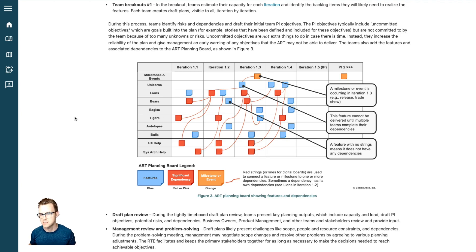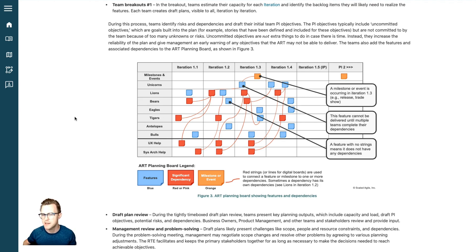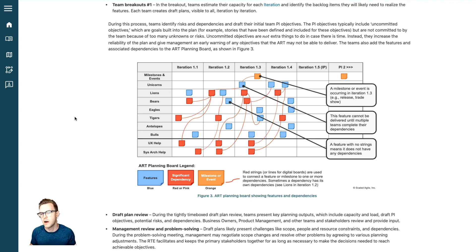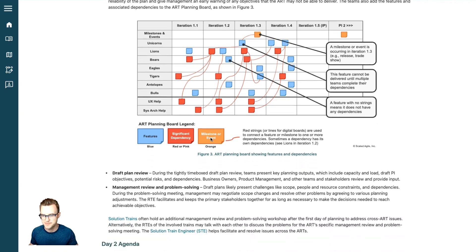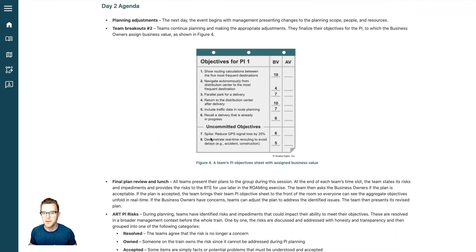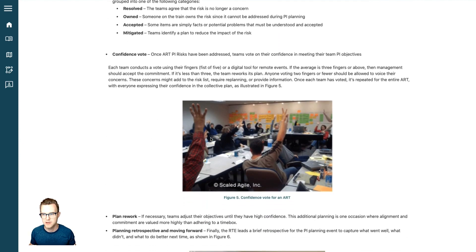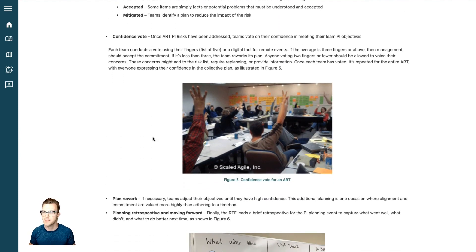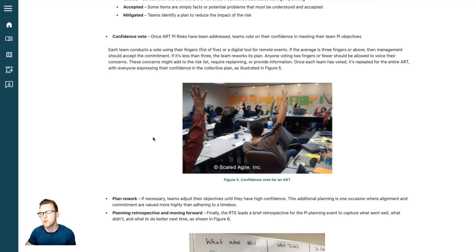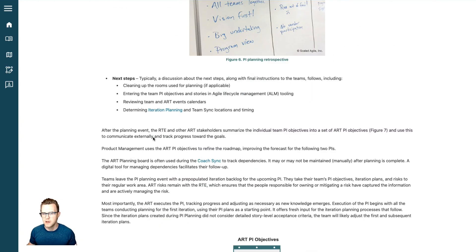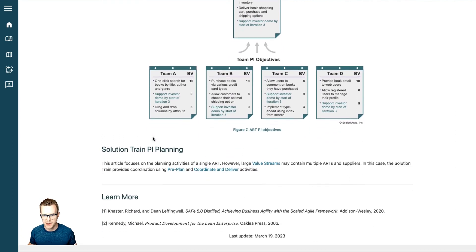What's the thing you can see really quickly here? It's those red dependencies. And so that's what helps leaders say, what things can we do to move the teams around, shift the teams up a little bit? What can we do now to prevent these red dependencies from actually causing issues on the roadmap? You can talk about that now versus when it's already too late and it's already occurring. Maybe in iteration 1.2, you're already here, might be already too late. The idea is you're bringing up, aggregating what the team's going to do at the end. There's also a confidence vote at the end of this. This is for accountability and also making sure that we're not missing someone's perspective.